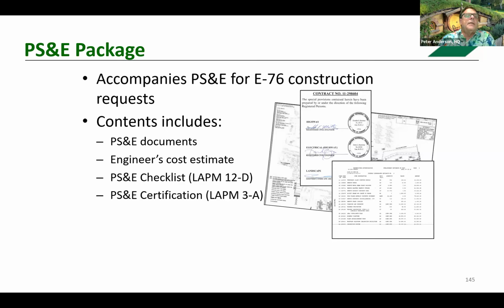Okay. So on the engineer's estimate, is it recommended to specify non-participating? Yes, absolutely. Non-participating work has to be separated out on the engineer's estimate. It has to be showing that this is non-participating.